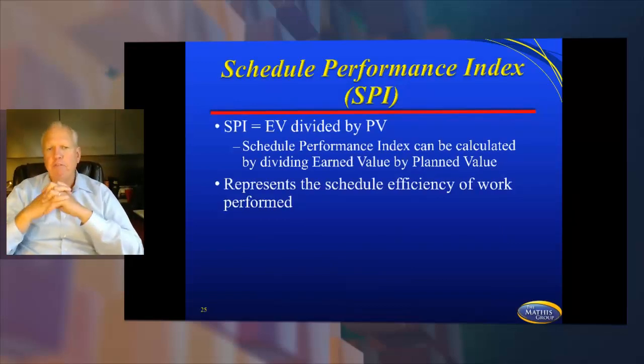All right, let's look at SPI. This is Schedule Performance Index. It's EV divided by planned value. It represents the schedule efficiency of work performed.